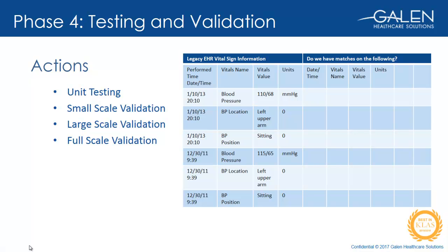It's kind of like a dress rehearsal. Some examples include maybe we identify missing patients and then follow up with the HIM team to ensure a plan is in place to get all the in-scope patients reconciled and loaded into the production environment. Another benefit is that we can test the migration build, which should have been moved to the production environment before full-scale testing. So via the refresh, we can confirm that that build is present in the test environment.